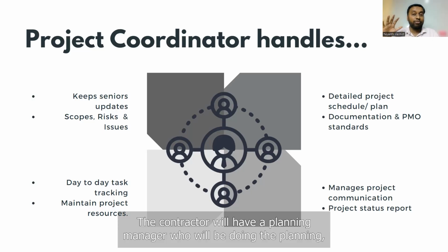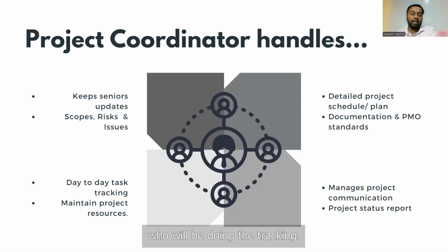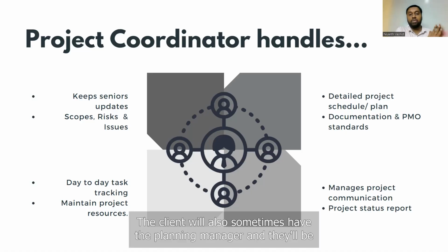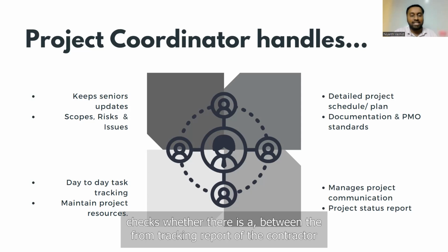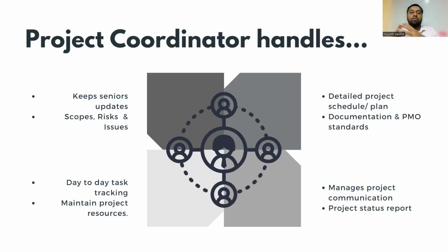The contractor will have a planning manager who will be doing the planning, who will be doing the tracking. The client will also sometimes have the planning manager and they will be doing the tracking themselves. But the project coordinator is the one who checks whether there is transparency between the tracking report of the contractor versus the tracking report of the client.